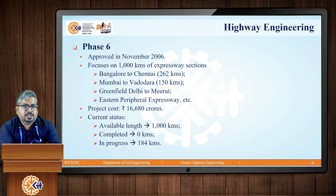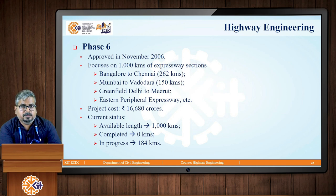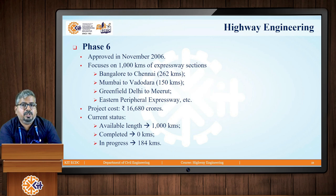Phase 6 was approved in November 2006, with a major focus on 1,000 kilometers of expressway sections. The roads considered included Bangalore to Chennai (262 kilometers), Mumbai to Wadawada (150 kilometers), Greenfield Delhi to Meerut, Eastern Peripheral Expressway, and others. The estimated project cost was rupees 16,680 crores. The current status shows the available length is 1,000 kilometers, out of which zero kilometers have been completed so far, with work in progress on 184 kilometers.